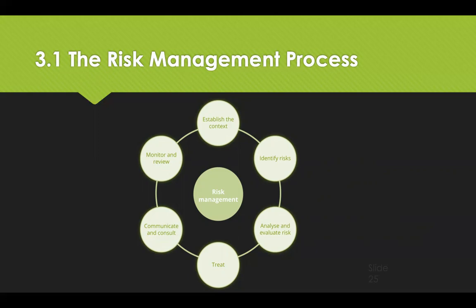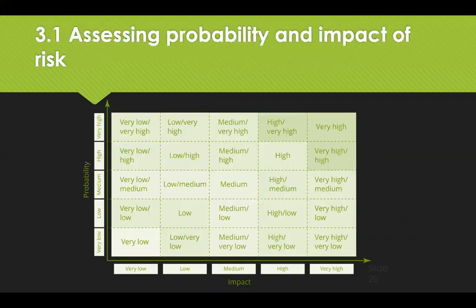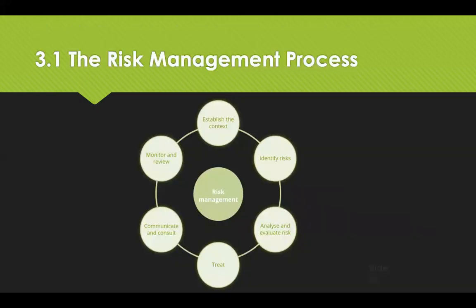Identify the risks using methods such as environmental scanning, stakeholder engagement, or comparison with similar projects. You could use tools like STEEPLED analysis, stakeholder engagement, looking at similar projects and purchases in the supply chain. The third is to analyse and evaluate the risks, assess the probability and the impact of a potential event, and record this in a risk register.